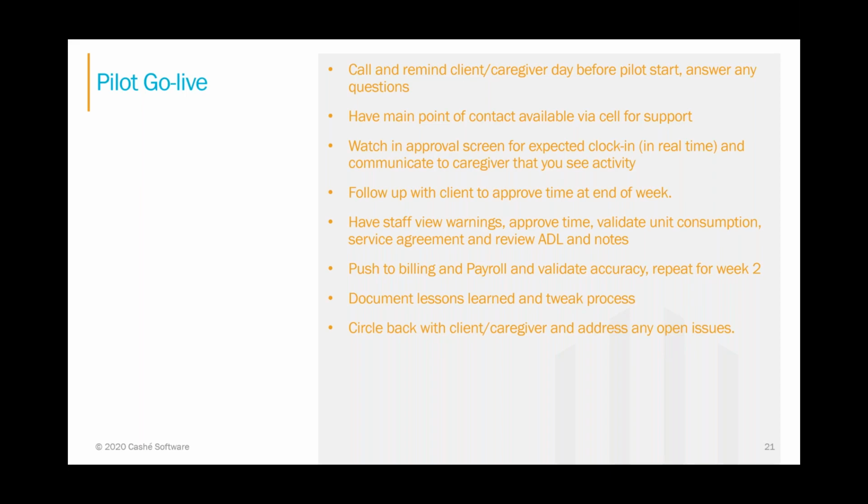It is important to go back and talk to clients and caregivers, address any open issues that they might have, as well as take all the lessons learned and create a frequently asked questions list, so that when you onboard new clients and new employees, you can share with them some of the issues that they might run into, and give them a frequently asked questions list.